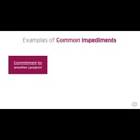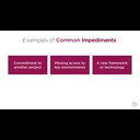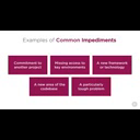If there's anything that seems to be slowing you down, you should feel completely comfortable bringing it up so we can work as a team to help address it. These may be organizational issues, such as an unexpected commitment to another project, or not having access to the environments that you need. In that case, it's my job as a Scrum Master to work to resolve these issues for you. But you can also use this as a forum to bring up any issues on which you're stuck. These could be a new framework that you need to get experience with, an area of the code base that you know you'll need to change but you haven't worked with before, or just a particularly tough problem that you can't figure out how to solve.